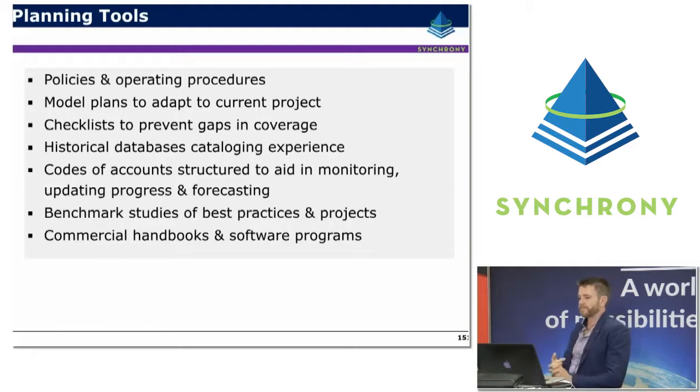So planning tools. There's a number of different tools that we use to enhance planning. So firstly, it's organisational policies and operating procedures. Model plans to adopt to the current project. So you might have some templates and things like that that can be adapted to suit the needs of a particular project. It's really handy to have checklists in place, so you might have a baselining checklist where you identify a number of the activities. Helps make it simple for people to provide a bit of assurance that they've gone through the right thought process for the baseline.